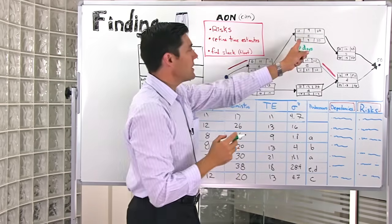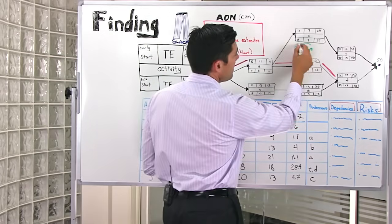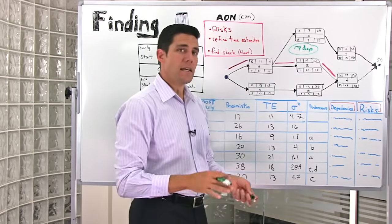Quite simply, 28 days minus 11 days gives me 17 days. So what that tells me is across this path, I've got 17 days of slack.